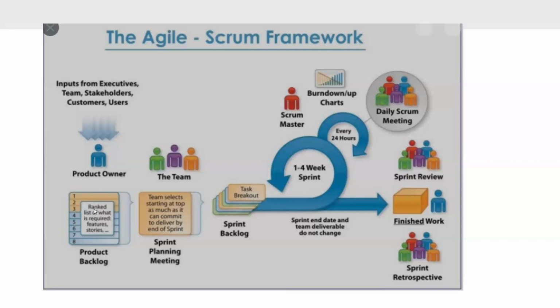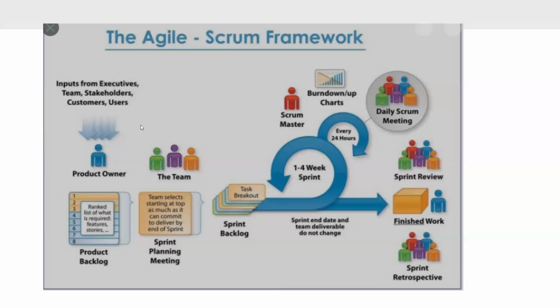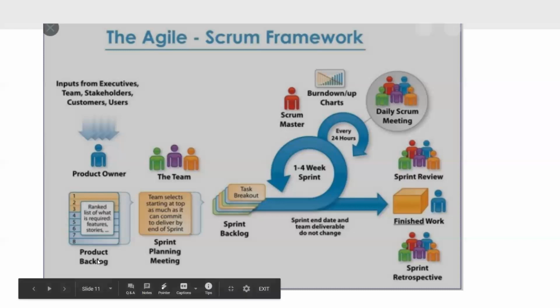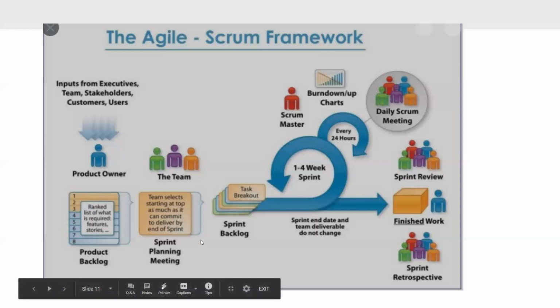They do have a product backlog that they maintain. So say, for instance, the business partner or customer says, I want a UI screen in order to accept payments. The product owner will receive that as an intake. The product owner will put it on the backlog, which is right here, which is essentially a product backlog, a list of requirements. They will then go and prioritize those requirements with the team.